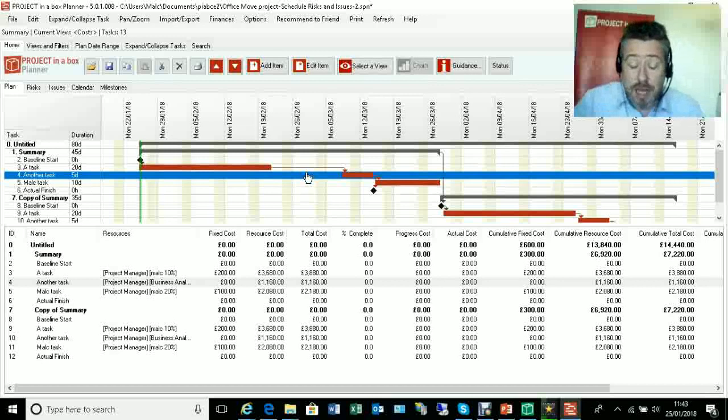And if we're trying to aim for a deadline date, sometimes putting these breathing space, these lags in between tasks, can help you with that. You're not immediately end loaded, one thing's finished, another thing's starting, etc. If you've got the time. But if you're promising somebody a delivery date for your project, you're just building, again, a technical term, contingency. You're building a bit of space and gap into that to allow you flex when things might not go exactly as you planned.